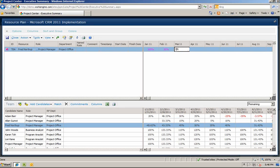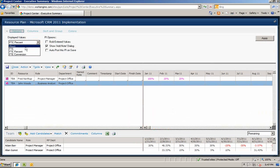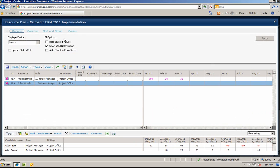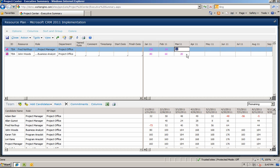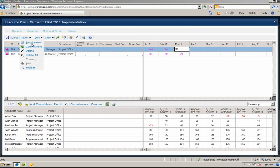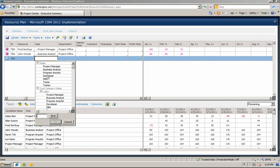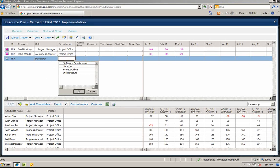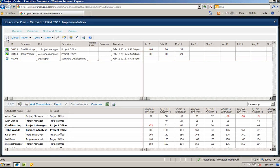Let's also assign John Woods as a business analyst. First, we're going to change the display value to represent hours versus a percentage, and then we'll add his hours. For the development resources needed, we must request the resources through the department manager and allow him to assign an available resource. We will need to add a requirement and then select the role and department in which we need a resource. Once we click save, an email will be sent to the software development department manager, notifying them of the request for a resource in their queue.